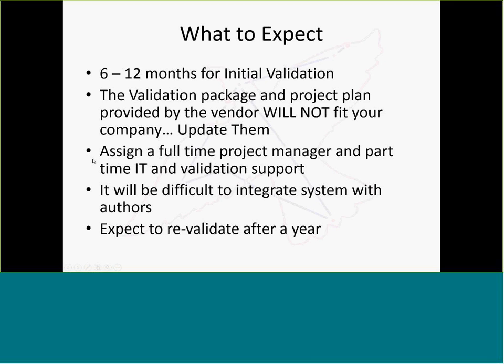And watch out for this. And this is the biggest surprise to most companies. They have to revalidate after a year. No matter how much planning you've done in your validation package, how well you've trained everyone, the system, as it's validated and installed, will not support your company as well as it could.